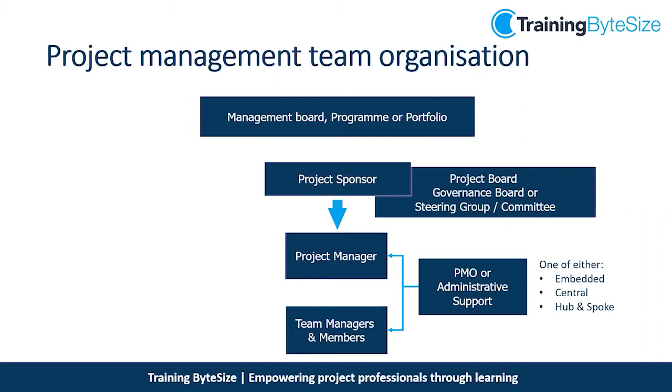So this project team has a direct contact with their admin, direct contact with the project management office. A central one is able to support as a central part of the organization that supports lots of projects. So if you have lots of small projects, then you have a centralized area that enables consistency of approach, a centralized place for training, record keeping, databases, configuration libraries, center of excellence for things like HR support, stuff like that. And it's a centralized area to allow consistency between projects.